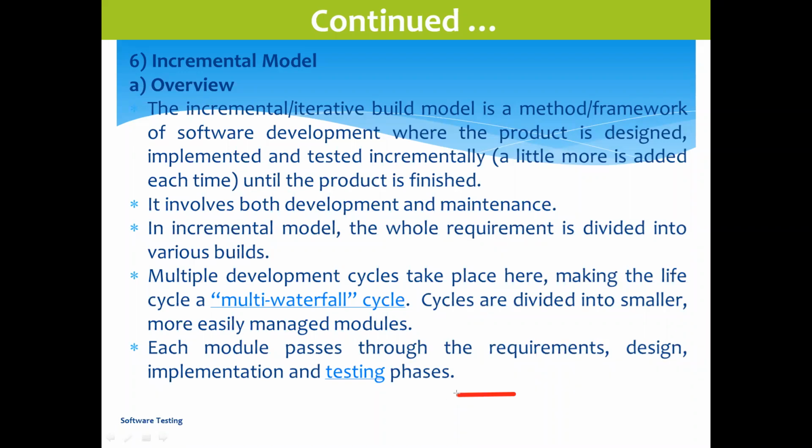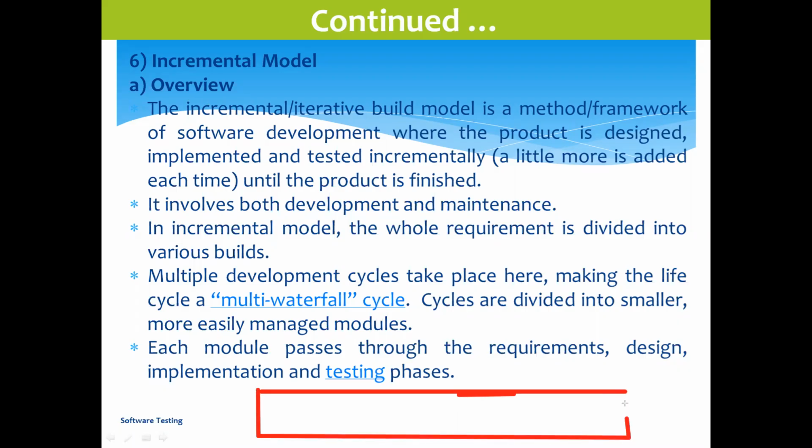So what will happen? The total project will be divided into multiple releases. Suppose the total is 3 months. In that case, it will be split into 15 days release, 15 days, 15 days, 15 days, like that it will be divided. In this, a few features will be there. Suppose 5 features are there. In the second release, 5 features are there. Those will be small releases only.